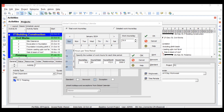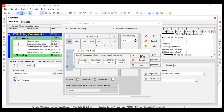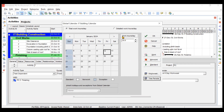Change the hours per week: 10 hours multiplied by 6 days equals 60 hours per week. For hours per month, assume four weeks: 60 multiplied by 4 equals 240 hours per month. For hours per year: 240 multiplied by 12 equals 2,880 hours per year. This is an approximate number. Click OK.